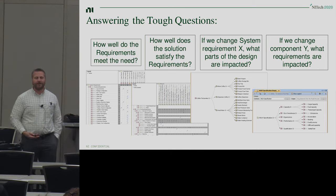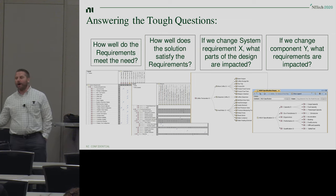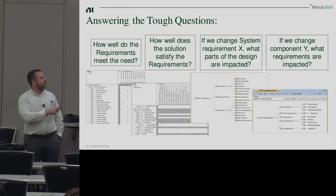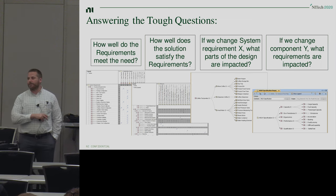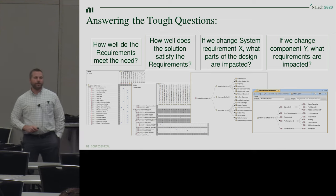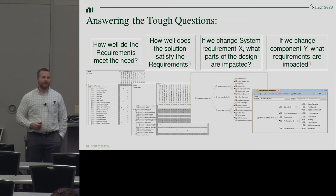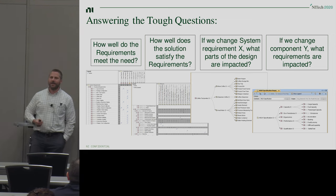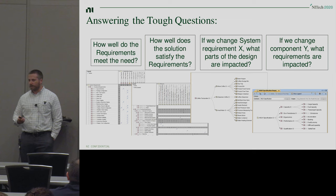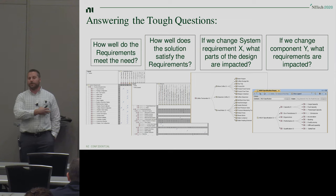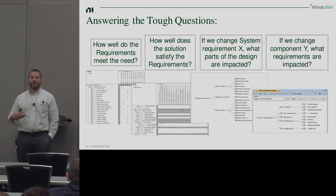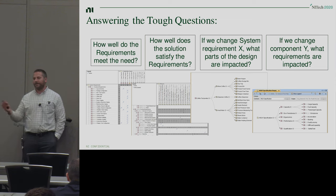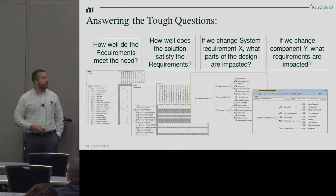I was disappointed to report that as the project went on, our model got stale. We were disciplined about using the modeling tool early in the project, but lost that discipline later. We started using other tools to manage the project, so the model got stale. That's the whole point of this — having a single source of truth. When you lose the single source of truth it gets very difficult to keep things in sync. So that's a little taste of model-based systems engineering, the way we applied it, the tool we used, and a little taste of the methodology.